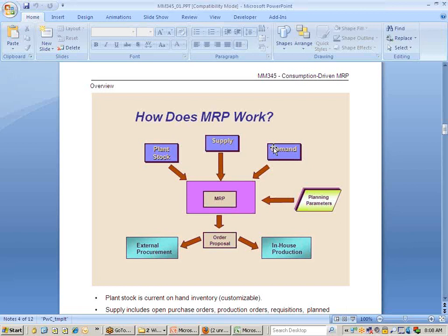Your average cement consumption in your housing project is 10 bags per day. Right now you have got only 4 bags and you are calculating the requirements for the next 1 week, let's say. So how many bags do you require? 74 bags. Which dates? 74 or 64, whatever, right?